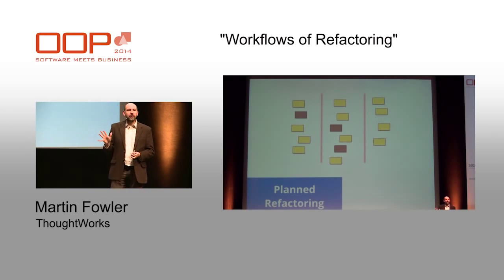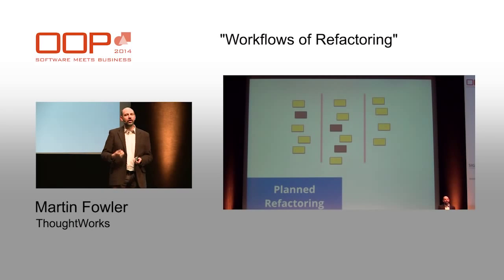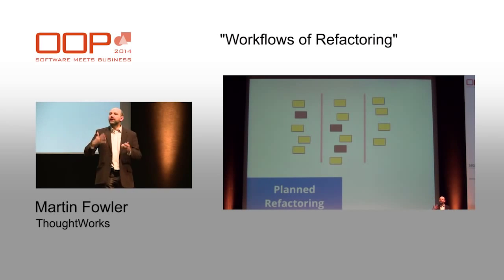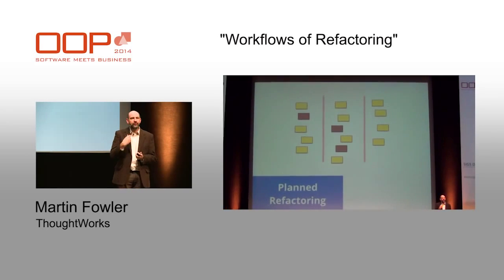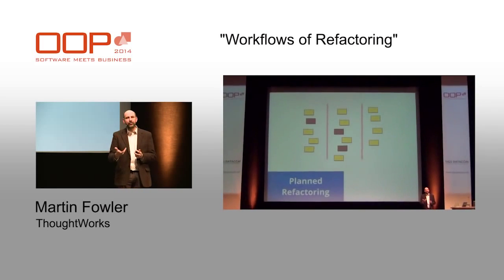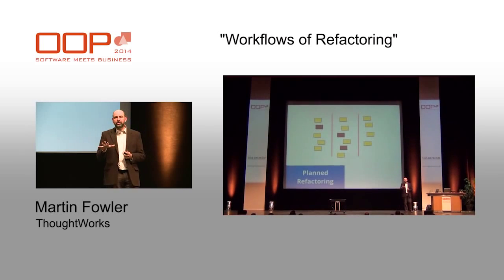Now, my view is that planned refactoring, a good team should hardly ever have to do planned refactoring. In fact, the perfect team would never do it at all. Not because they're not refactoring, because a team is always refactoring, but they're able to break it down into smaller pieces. It disappears inside the work of adding new functionality, and therefore never becomes a line item on the plan.